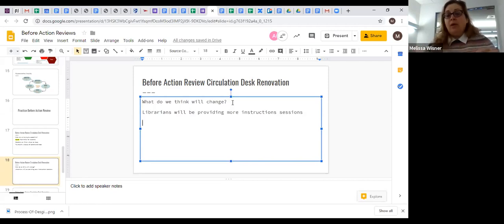So sometimes that happens as well. It might be, again, things in the non-functional requirement. It may be actual work that you hadn't thought of yet that you need to reflect. So it could be making sure that there's technical orientation to the instruction rooms. You might need a new reservation or calendaring system. It's not that when you walk through this process that you're not adding to the project plan, you're very much doing that as well.